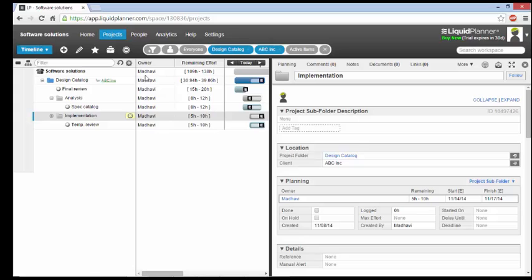One thing we need to remember is when we are going to estimate the task, we are going to enter the ranged effort estimates. We use the ranged effort estimates because it helps us to capture the uncertainty. We need to see the uncertainty so that we manage the effect it has on our plan.